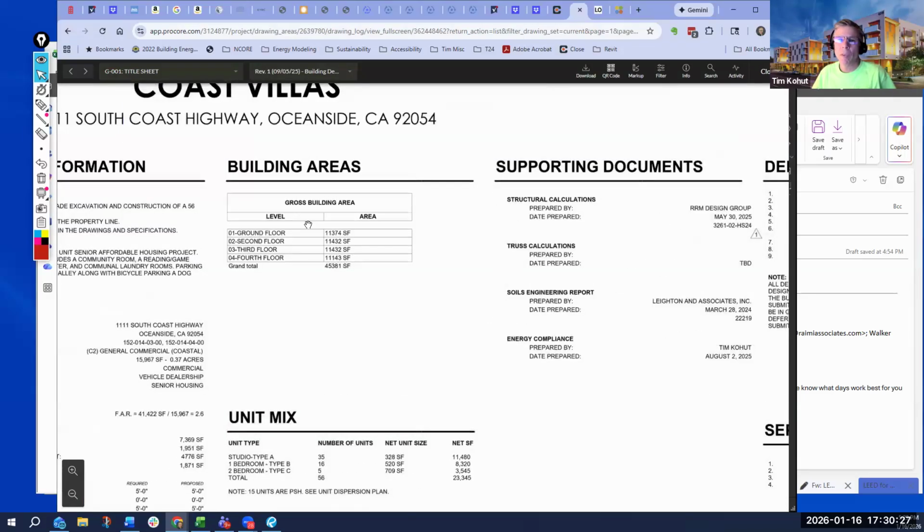Okay, so when we've got to find stuff like this, hunt around the drawings, because for building permitting processes, they've got to identify overall building square footage and types of construction. When we build out of wood, there are limitations on how big the building is. So you can generally find the overall square footage on the cover sheet. It's 45,381.